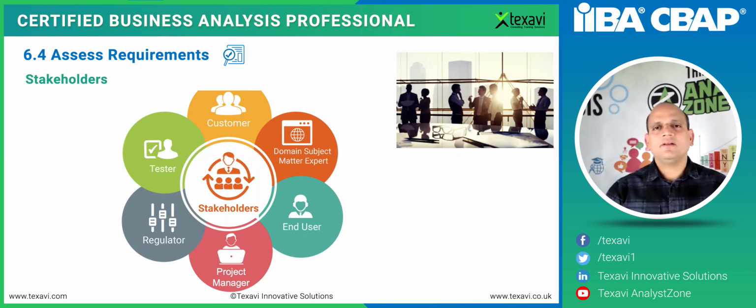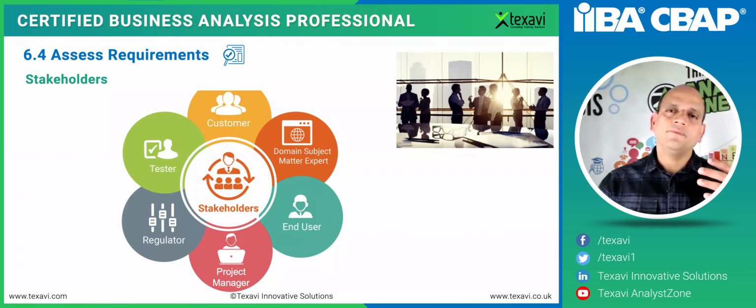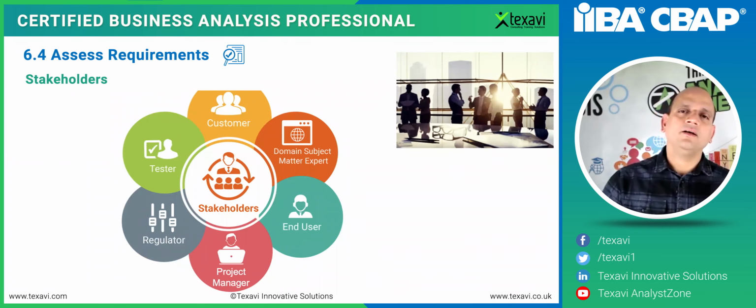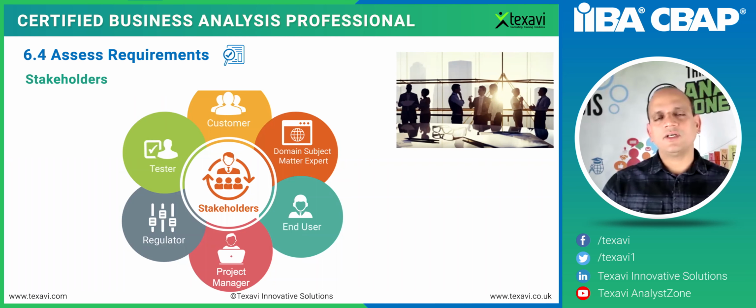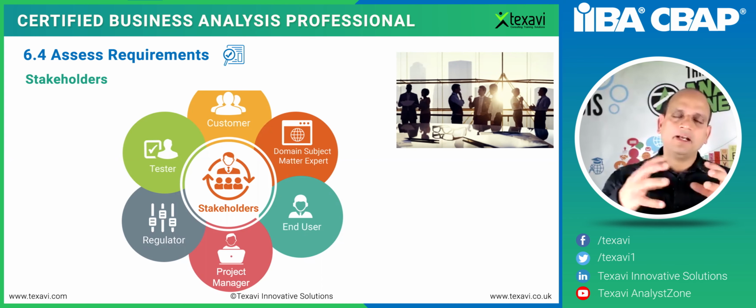So for example, if you've got 10 features in your product and they're all working well and everything is ready to be deployed in the next release, and then the second and the fifth features get changed, with the changes on those 2 features out of 10, what would be the impact? Would the rest of the 8 features work all right? Are they having some kind of impact because of the 2 that got changed?